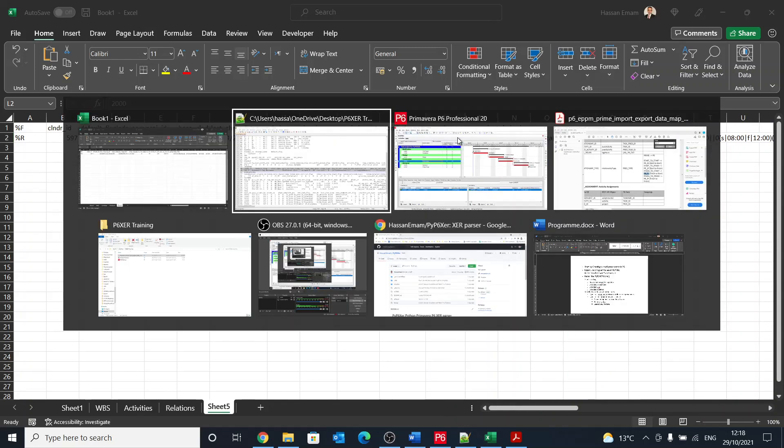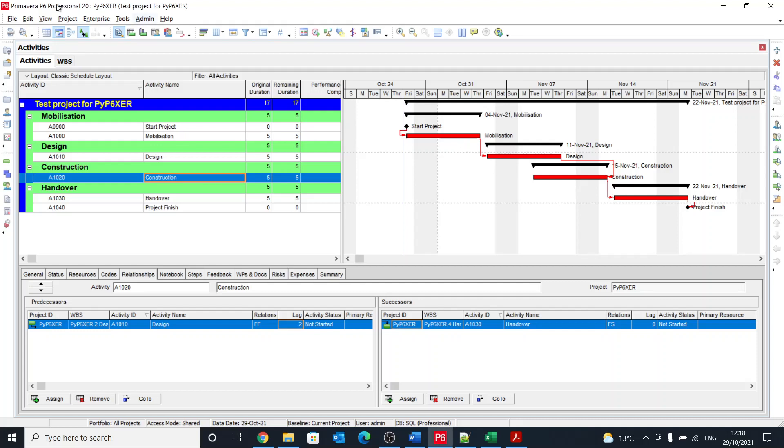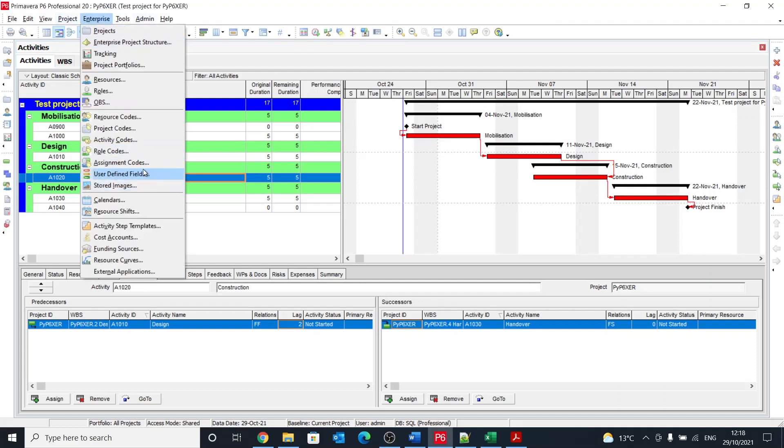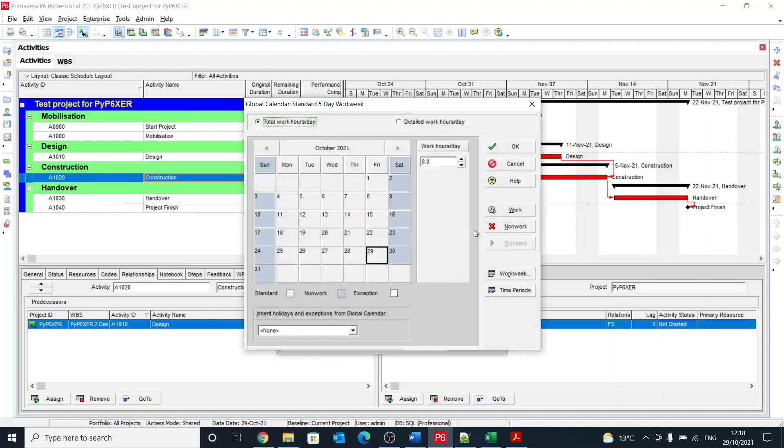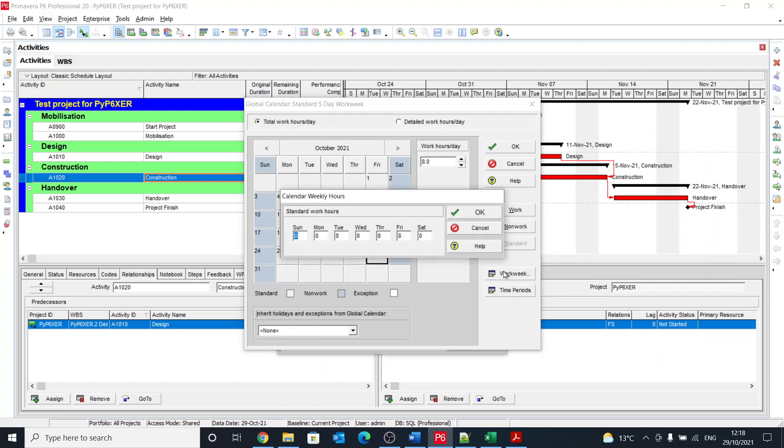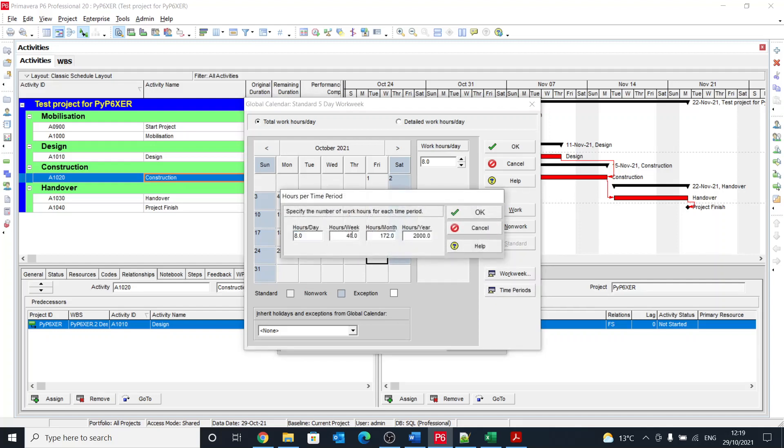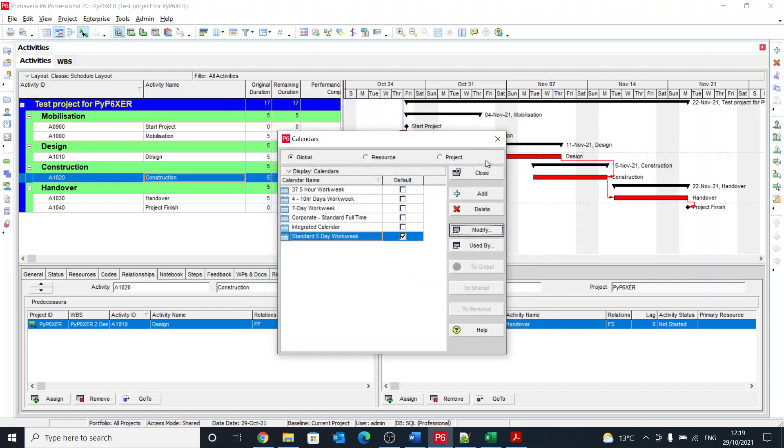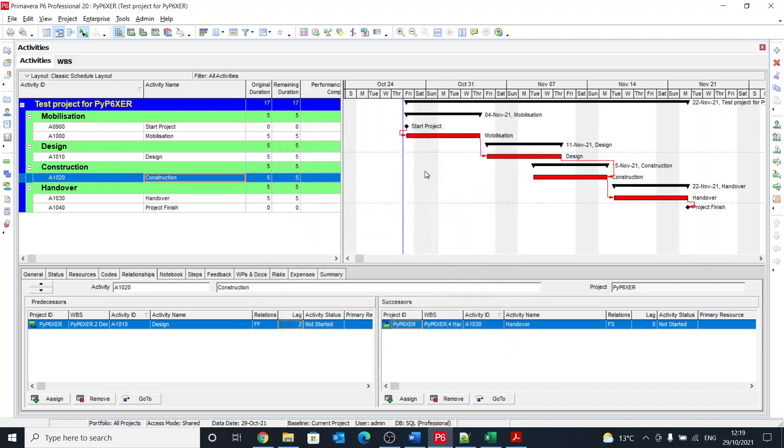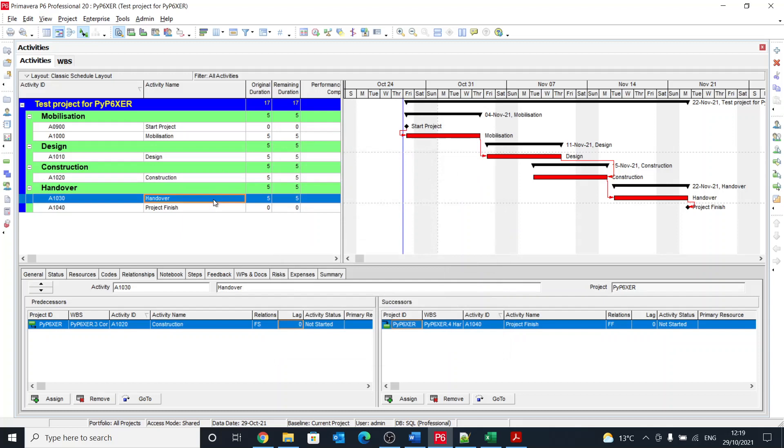So if you go back to P6 to calendars, where are my calendars? Yeah, here we go. And then I modify this to look at it, and it's eight hours per day. And if we open that also to show how many hours every day is allowed, the time periods: eight, 40, 172, and 2000. We'll have a further discussion, more detailed discussion on the calendars in coming sessions.